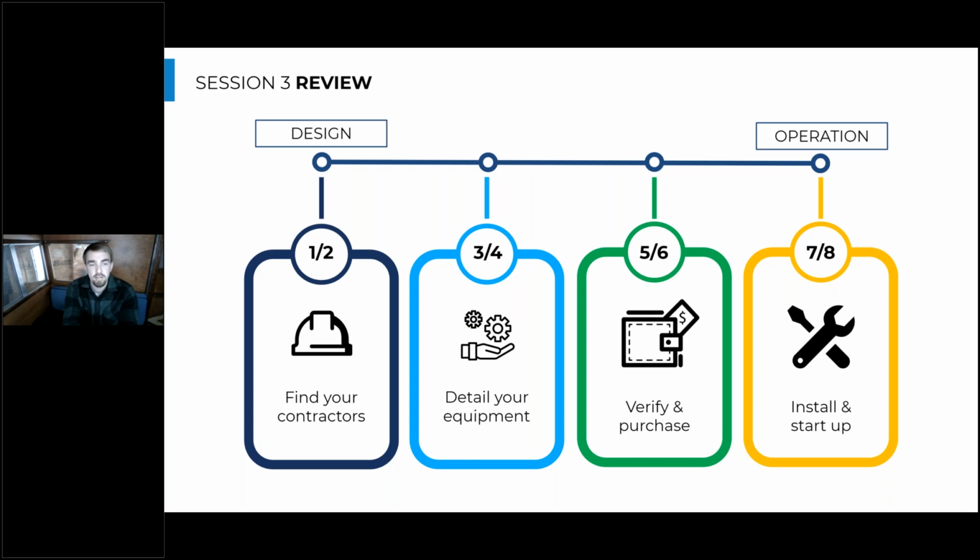And we also talked about the verification and purchase of the equipment. Since this is a quickly evolving technology, there's often going to be data or requirements that will change and evolve with the evolution of the equipment itself. So the equipment that's been spec'd in the design may be slightly different than what you'd receive if you ordered it after the full gestation period of the job. So it could be months or years later. So you want to make sure that you verify all the right information with the manufacturer so your equipment still matches what your designer intended to install into that system.